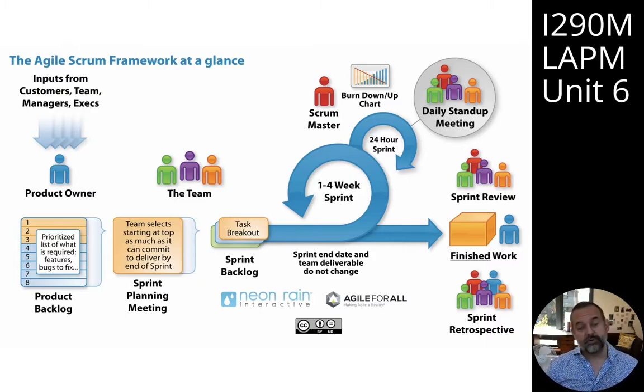In Scrum, as we've discussed, there are three roles. There's the product owner, the Scrum master, and then the delivery team. There are also 5 events. There's the sprint, which is what Scrum calls an iteration. There's a planning meeting for the iteration called the sprint planning meeting. There's a daily meeting called the daily Scrum. There's a sprint review meeting where we look at all the work that was done in the iteration and review and accept that work, or if it's not done to the satisfaction of the product manager, then that work will carry over into the next iteration.